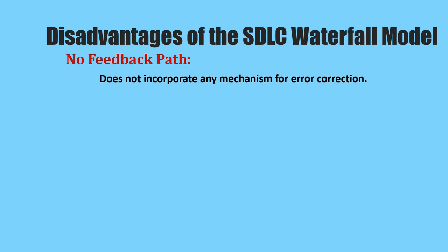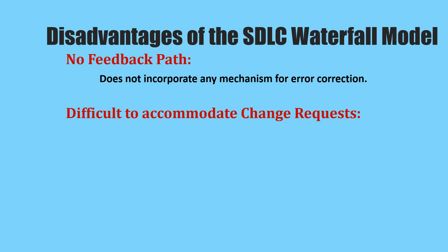No overlapping of phases. This model recommends that a new phase can start only after the completion of the previous phase. But in real projects, this cannot be maintained. To increase efficiency and reduce cost, phases may overlap.